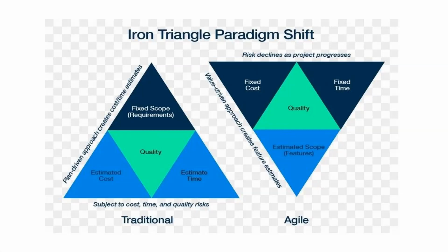Deliverable capability. You know that maybe it's 20 story points that this agile team can effectively deliver and meet the business need. Based on that, you know the cost of one sprint, if it is 40K, and you're having 50 sprints, the cost variation should be minimal, maybe within a tolerance of 5 to 10%.